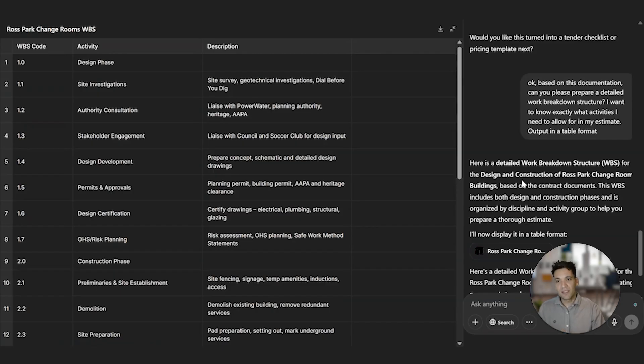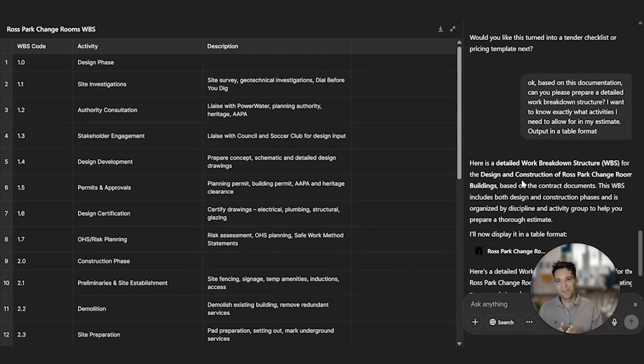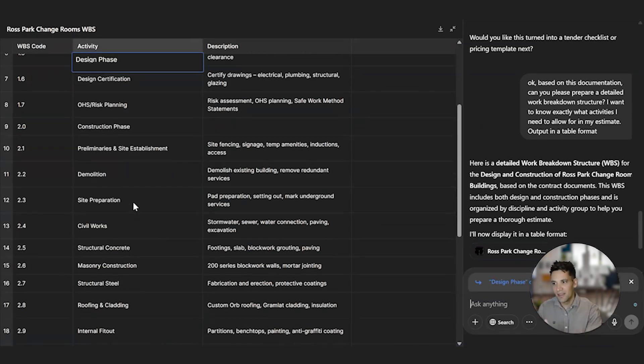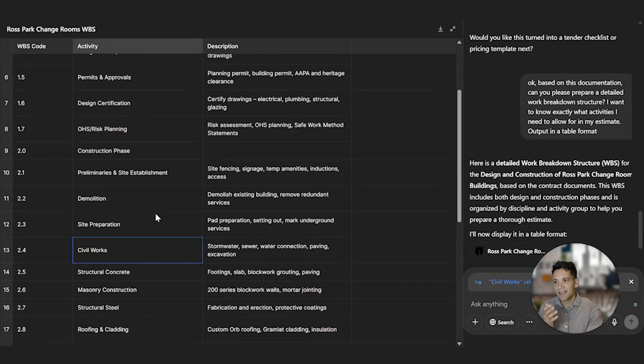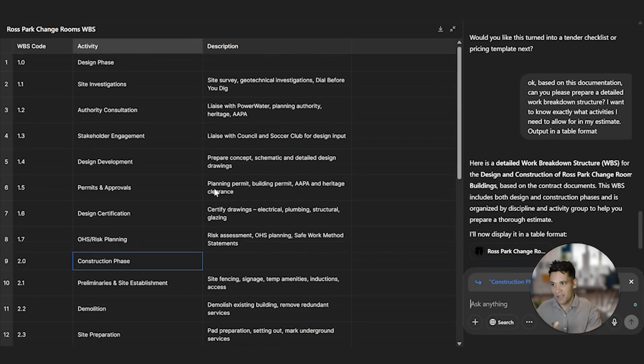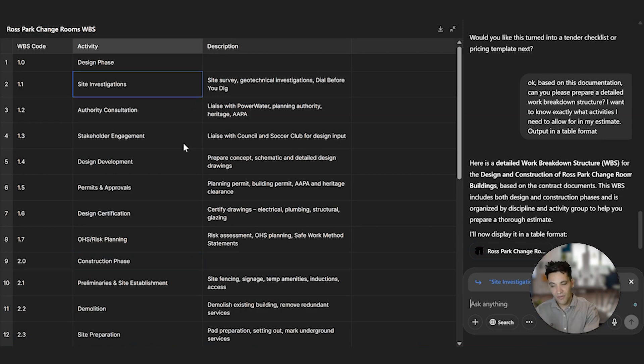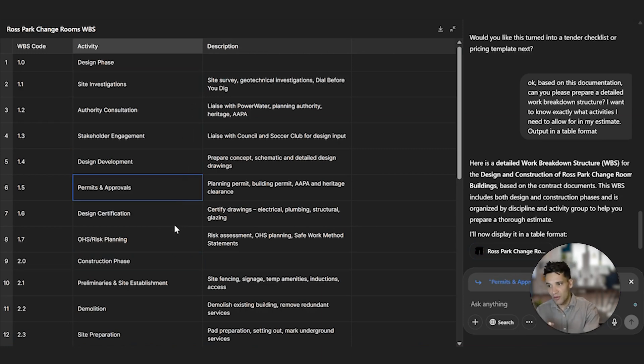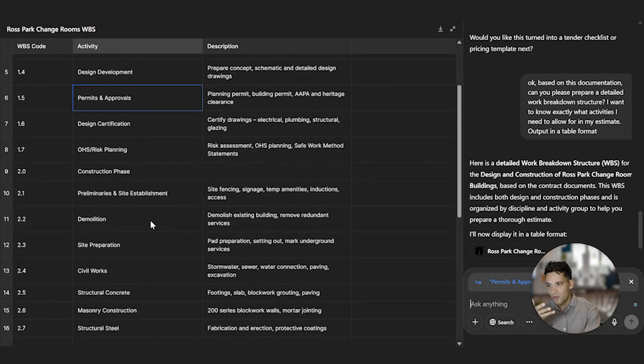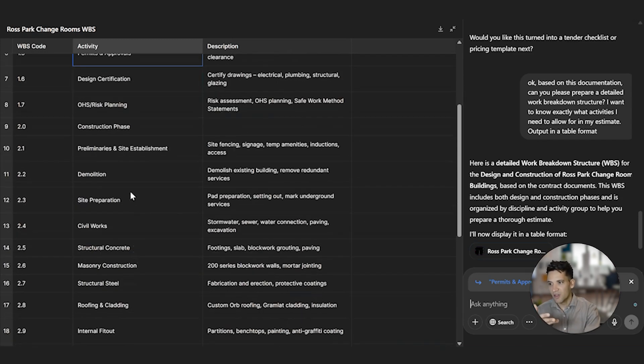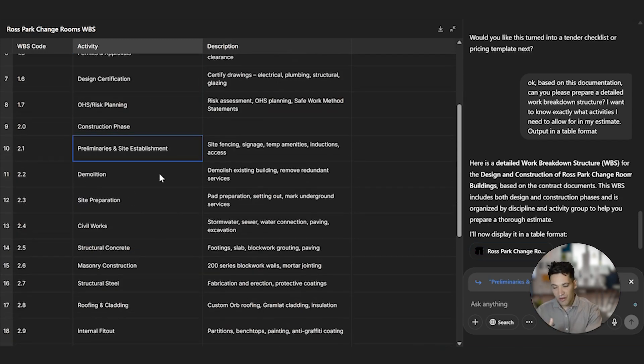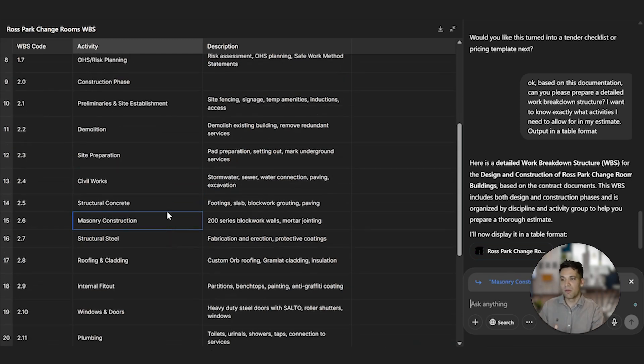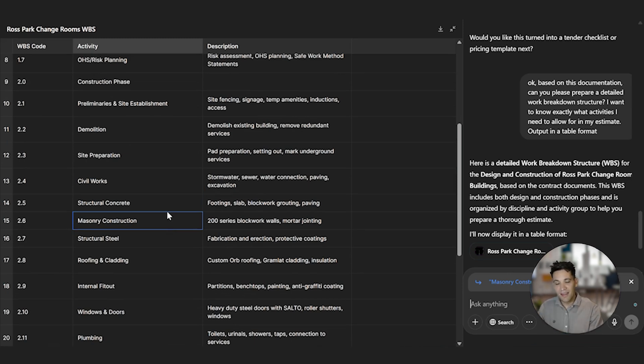So the prompt I've used now is based on the documentation provided, can you please prepare a detailed work breakdown structure? I want to know exactly what activities I need to allow for in my estimate. So it's broken down into design phase and construction phase, and it's outputted this in a table as I've asked it. So during design, it's got site investigations, authority consultations, stakeholder engagement, design development, permits and approvals, and so on. During construction, it's got preliminaries and site establishment, demolition, site preparation, civil works, structural concrete, masonry construction.